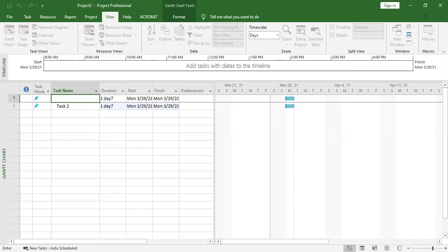For example, if you are the same company, okay, like you are in a company, and you know that we have 40 engineers, we have only 3 project managers and this. It is better you create one file that has all those resources. So you can always refer to that. You don't need to repeat. So when it is even across multiple projects, you can know very well that maybe I've over-assigned resources. Maybe I've assigned someone in 2 different projects at the same time.